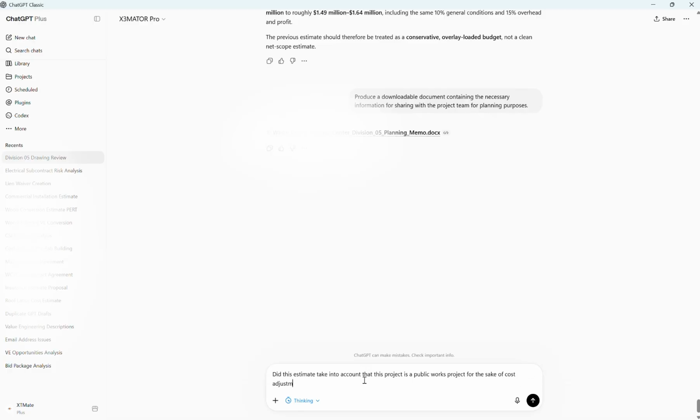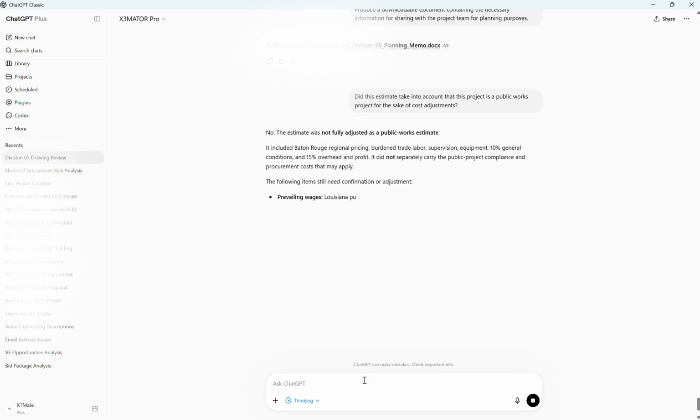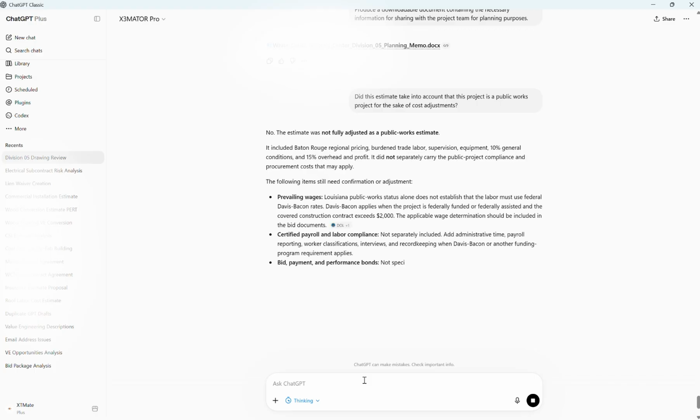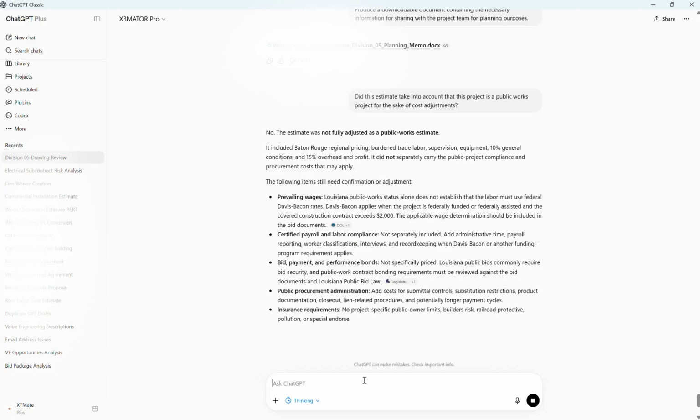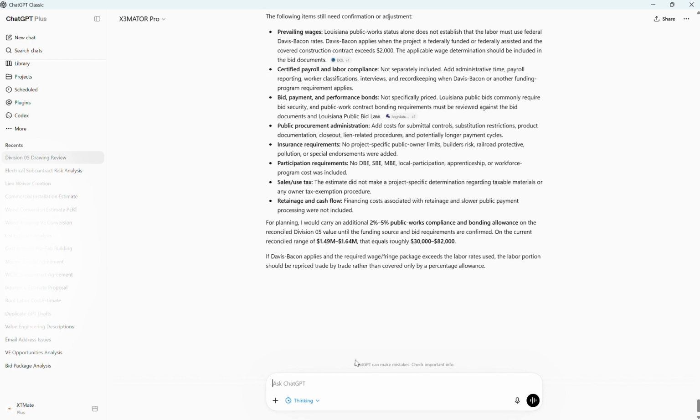Because this is a public works project, the pricing runs through a public works adjustment at the line item level, a 13% reduction against the database rates. You can see the base unit rates and the adjusted unit rates side by side, so nothing is hidden inside a blended number. Material, labor, and equipment are extended separately on every single line.